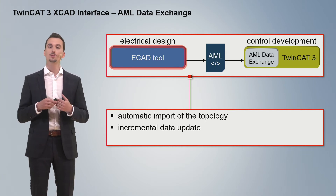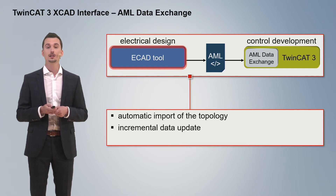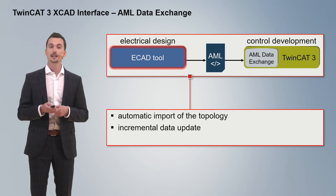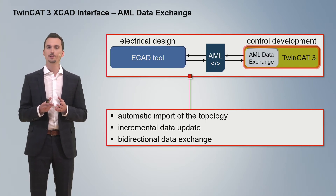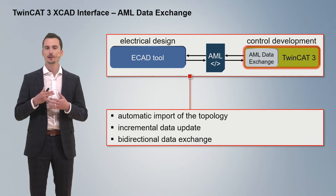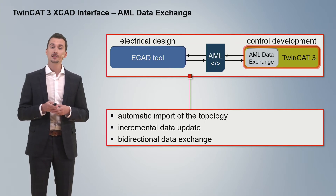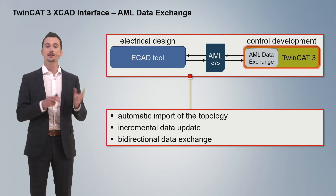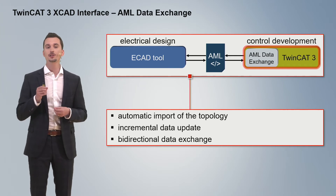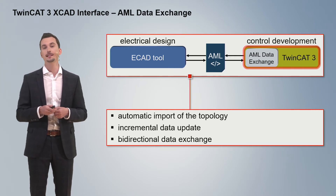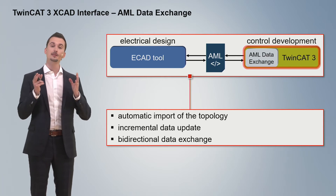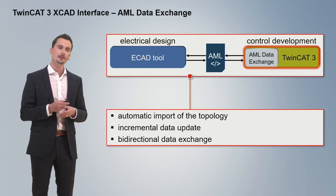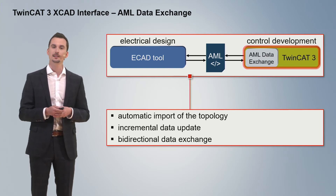If we switch to a later stage in your project, for example the commissioning phase, and there are any late changes necessary, for example changing an IO terminal, then you would like to update also the ECAD tool side. This is also possible with the help of a bidirectional data exchange. So you can simply export this new updated IO topology and import it into the ECAD tool side.